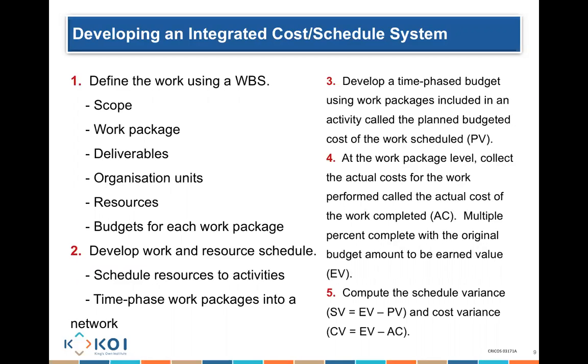So planned value. At the work package level, we collect the actual cost of the work. How much did the work cost me in comparison to how much I have earned? I need to make that comparison, which is really point number 5. Compare your earned value to your planned value in 3. Compare your earned value to your actual cost in point number 4.